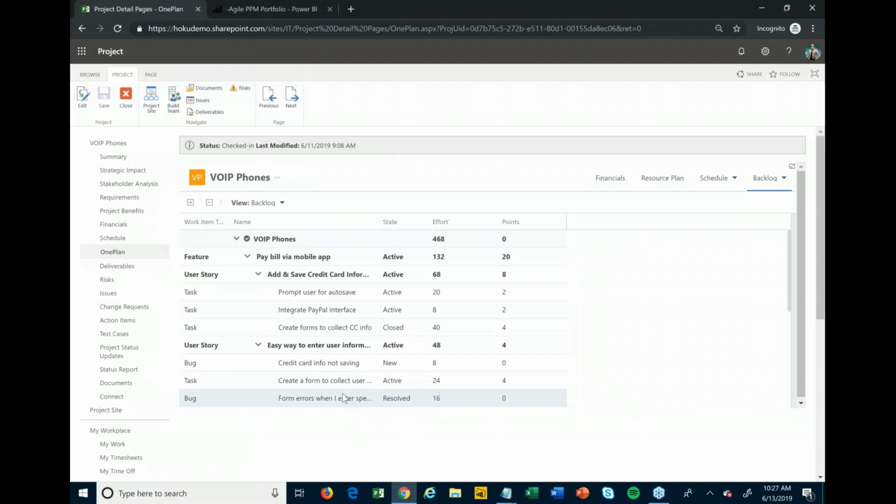So that's more from the project manager and/or scrum master or whoever's really managing this project from a resource, financial, and schedule perspective. One thing that we find is, even if you're connecting up to an Agile tool and you're managing this project in an Agile way, a lot of times people still end up keeping a separate project schedule or release plan or release timeline, if you want to call it that, separately from the backlog items. The reason being is most people only plan out a sprint or two ahead. So it's really hard to tell exactly when you're going to be finished.